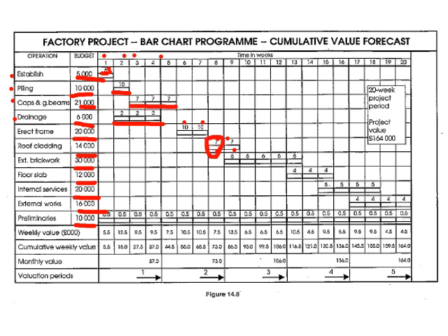Okay, fairly straightforward. Once you've done that bar chart or histogram, you can simply add all your costs. In this instance, you've got your preliminaries, which is divided over the 20-week period. So you've got your 5,000 plus your 0.5 to get a 5.5, and your cumulative value just underneath that.